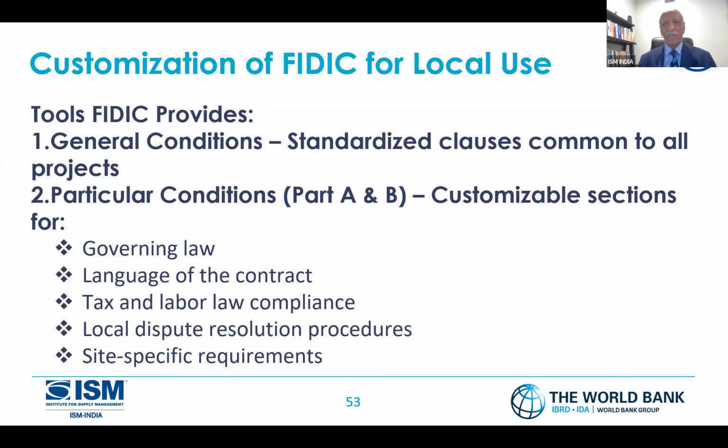Customization of FIDIC for local use. Customization means general conditions, I will follow standardized clauses common to all the projects. Particular conditions I can customize. So that means if I take a red book, a yellow book, or a green book, they have general conditions. General conditions I'll write down as they are, whatever is mentioned. But on top of it, depending on the country where I work, depending on the country requirements, I may have to create some customization.